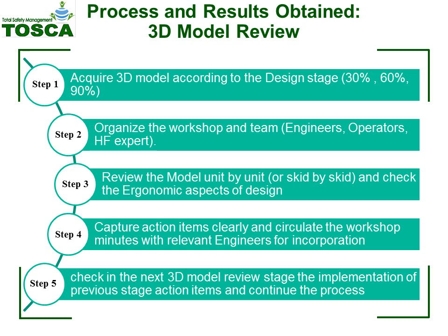be looked at. The first step is to acquire the 3D model from the design team. This model is developed to review technical elements of the design and can be reused for HFE purposes. Technical and HFE reviews of the 3D model can be conducted in the same workshop, either as one group or in separate groups to achieve time saving.